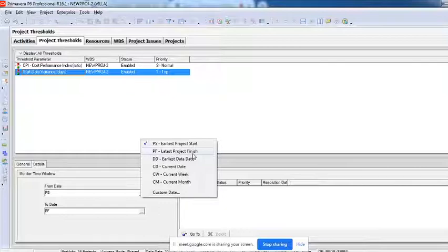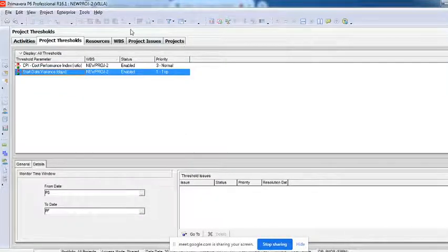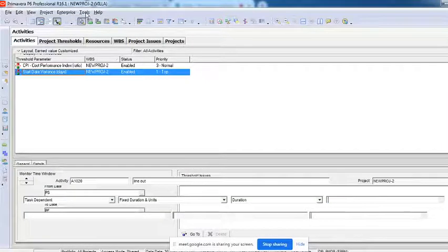If any activity is starting 1 day early, previous to the start date of the project or activity, or is delayed by 2 days, it automatically has to be identified as an issue. Okay, so we have selected early start date and late finish date, and after so much you will have to go to this option called tools.